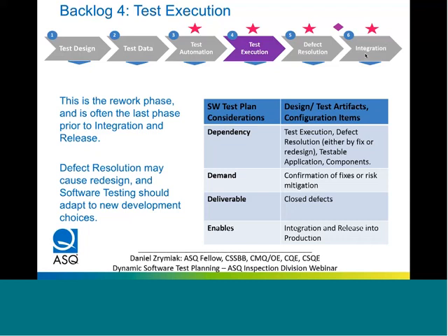So by changing the dependencies, the last point, removing waiting time and idle time from the critical path, that will compress the critical path and give you a better chance of meeting the deadline with what you have. So in order to do this, I'll just give a minute for the screen to refresh.